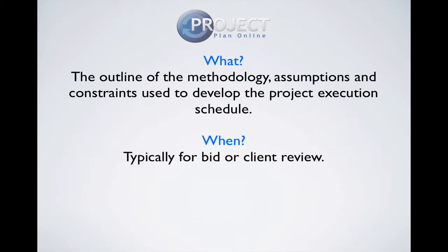When would you do it? Typically you'd do it for a bid review, when you need to explain to the bid review team how you came up with your schedule and why you were proposing that for the bid proposal. And once you start your project, you would document just how you went about the final contract schedule, explaining that to the client and the other stakeholders that are interested.